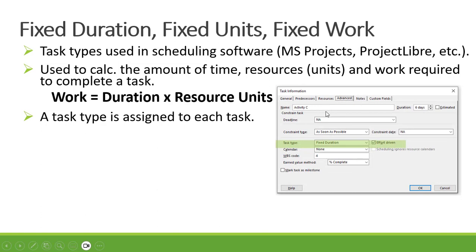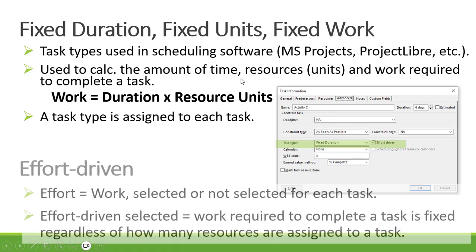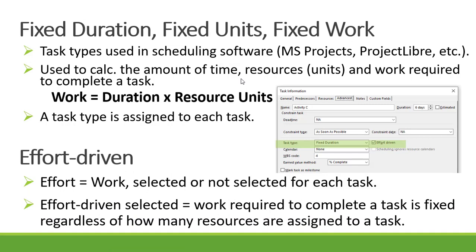In this example, we've got task information where the task type can be selected — either fixed duration, fixed unit, or fixed work — and effort-driven is either selected (ticked) or not selected (unticked). Effort-driven refers to work, and when effort-driven is selected, it means that the work required to complete a task is fixed, and will remain fixed regardless of how many resources are assigned.